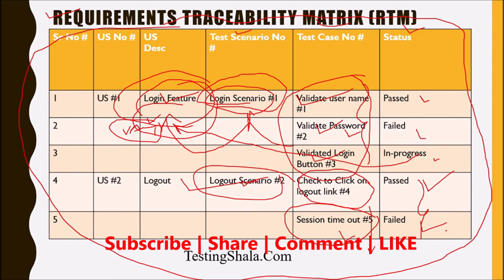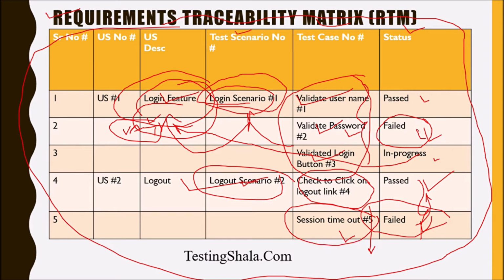We cannot sign off our deliverables until the failed test case is moved to pass. It would also provide an indication of which test cases are failing, and which requirement is affected. That would help the stakeholder to make a call whether to sign off the given release or not, based on the importance of that user story.